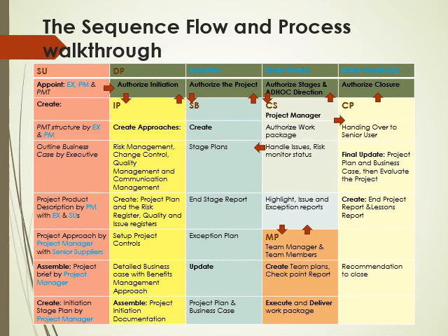So this cycle of managing a stage boundary, going into directing a project to authorize the stage, and controlling a stage and managing product delivery being active during this stage, and then once it's concluded, going to managing a stage boundary again, goes on and on until we have gone through all the management stages. So if it's at the final stage, what happens is once all stage activities are concluded, it means the final project product has been concluded, and then we go into the closing a project process.